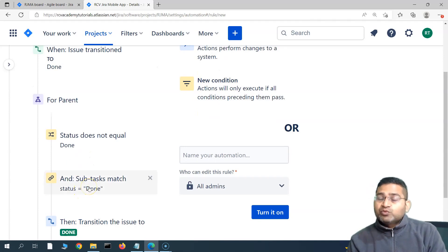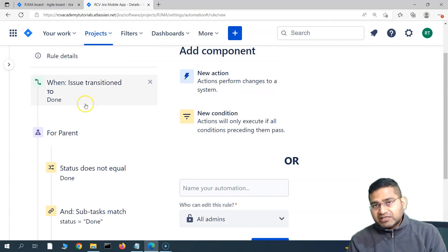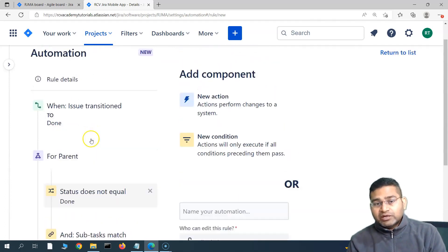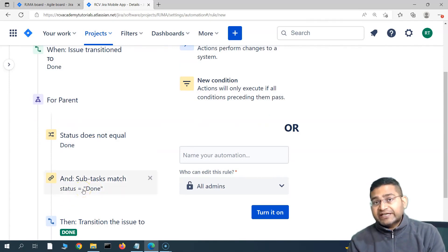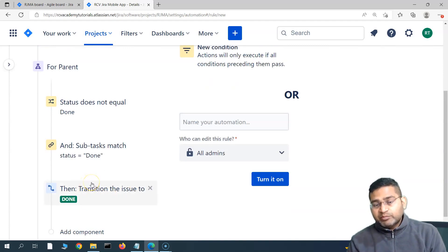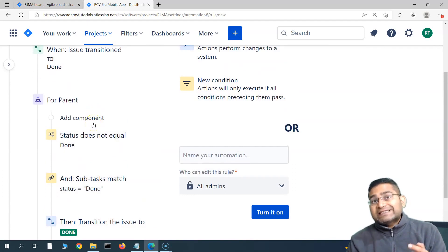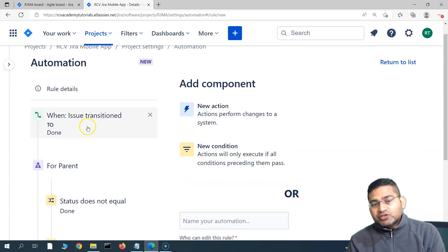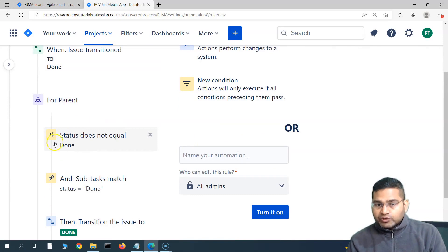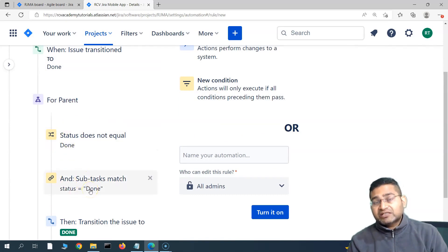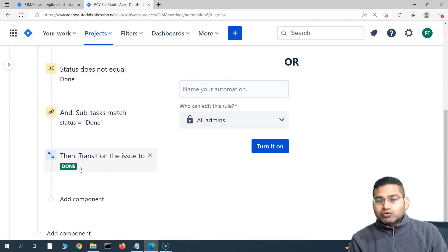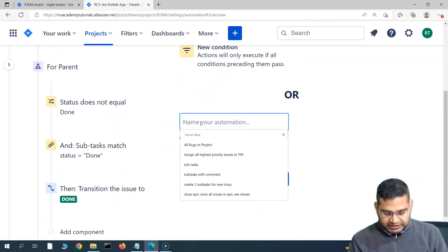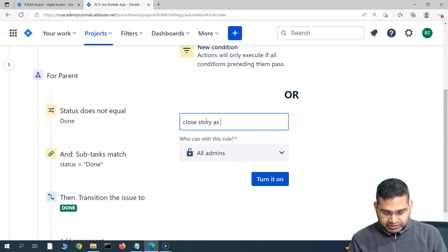Whenever an issue is transitioned and it has a parent, the rule checks that the parent is not completed and that all other subtasks within the parent are done. For example, if there are three subtasks and two are done and this is the last one being transitioned to Done, it will confirm the parent is not done and all other subtasks are done, then execute the transition. However, if two of three subtasks remain open and you close the second one, the condition will fail and the parent will not be transitioned.